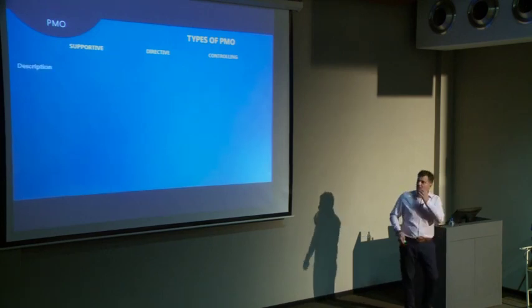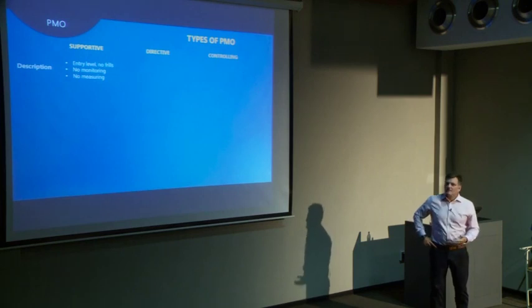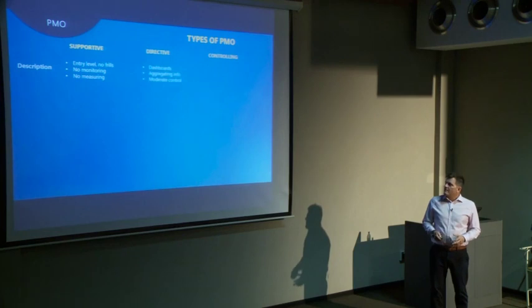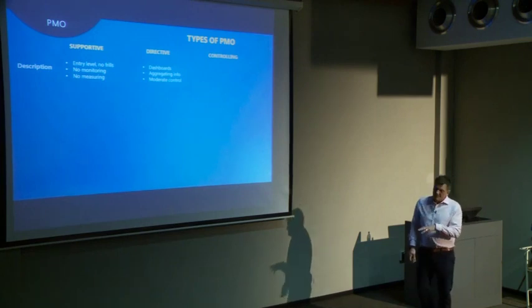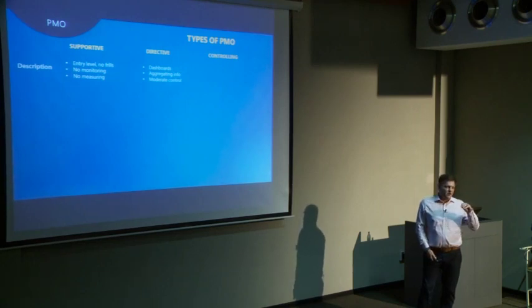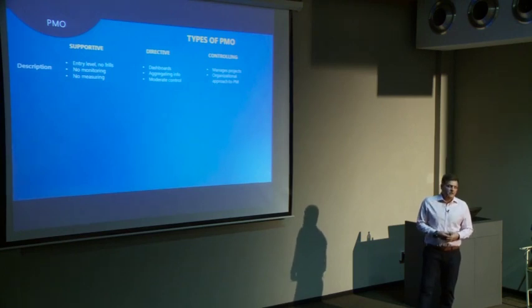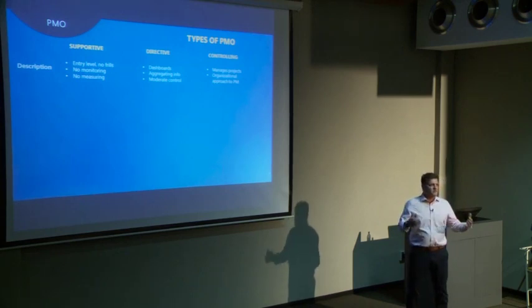The real description then for a supportive PMO is, I call that the entry-level PMO. All right, it's a no-frills PMO. It doesn't monitor anything. It doesn't provide any measurement for you. You got a directive PMO, which I call more the dashboard PMO, which they will produce dashboards to monitor progress on different projects, and they apply moderate control in the business, right? The controlling PMO really manages projects directly. And they take a systems approach, an organizational approach to project management.